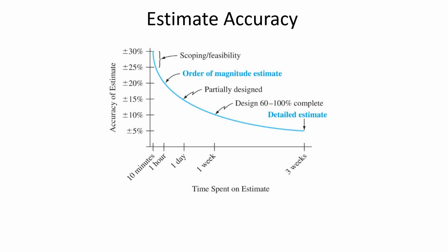If you've only got $5 million available and the building could cost between $40 and $60 million, there's no reason to put 3 weeks into your cost estimate if it's so obvious that your available budget is way less than what the costs are likely to be. On the other hand, a really detailed estimate maybe would be justified if you're at the point of actually putting a bid out for construction and you want to know what kinds of bids are going to be reasonable.